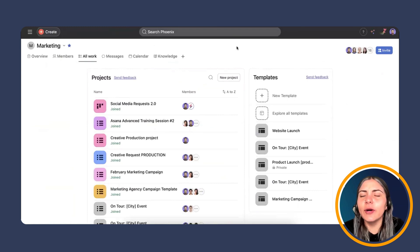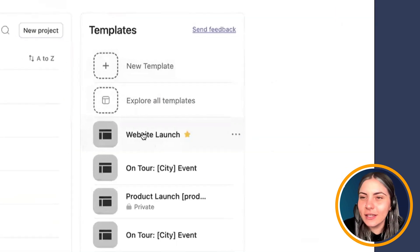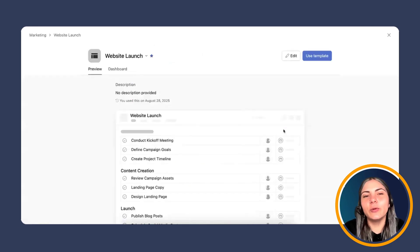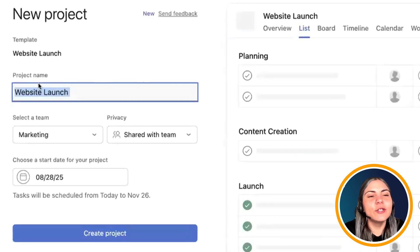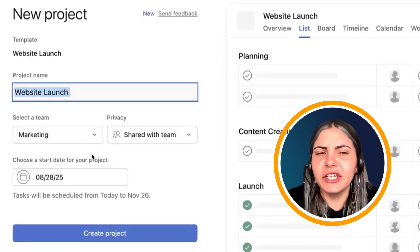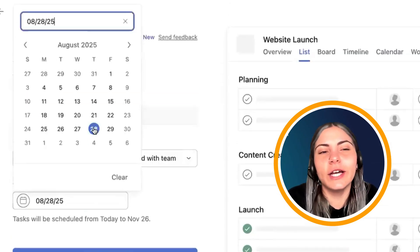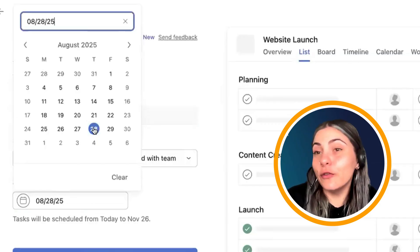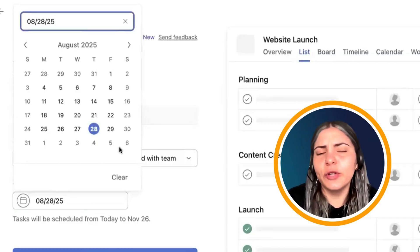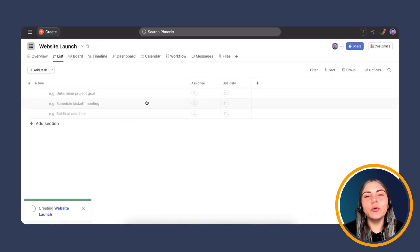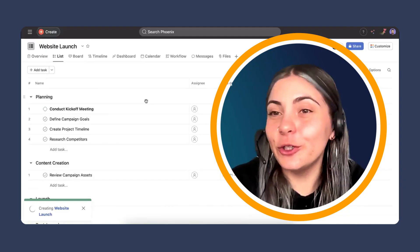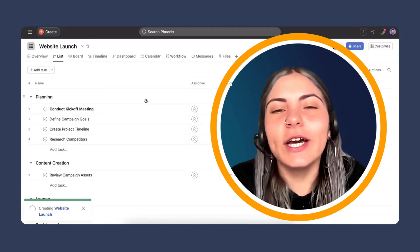I'm going to jump into Asana. I'm in our marketing team, and I'll kick off a new template using this website launch we have here. We'll use the template just as if we were building a usual project. If you're new to Asana, you put your project name, select the team, and privacy. In this case, our template is set to schedule after our start date, so all task due dates are based on that. We're going to create that project — it'll take a minute or two — and then I'll show you the custom fields and the back end of the rule.